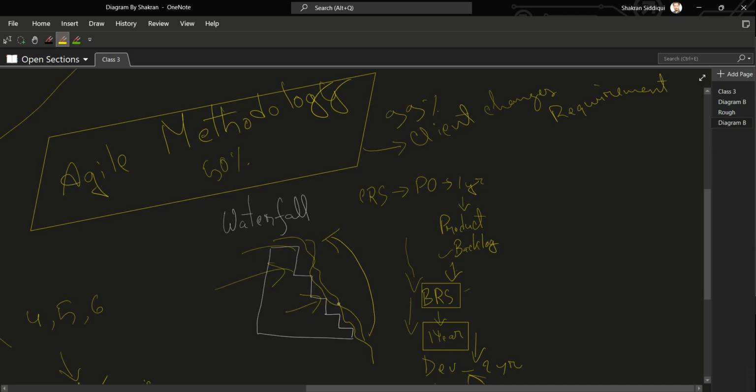After everything is built, created, and tested, if they want to add another feature or make any correction, they need to start from the very top. There is no other way. Going here, for instance, and fixing something, no, that cannot happen. They need to start from the top and finish it to the end. So this is why it is less confusing, because the requirement does not change. It is more stable, but it takes more time.